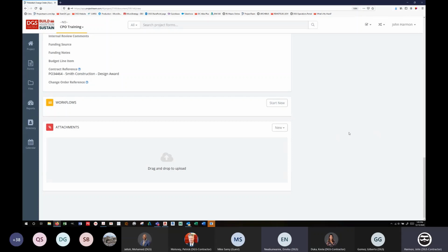Go ahead. Sorry, quick question. Going back to before Karen's last question, contingency is supposed to be part of your schedule of values, isn't it? Not necessarily. I set mine up just as a line item that I carry on the SOV, and if we approve for the vendor to bill against that, then it will be on their next invoice, and it will be progressed accordingly.